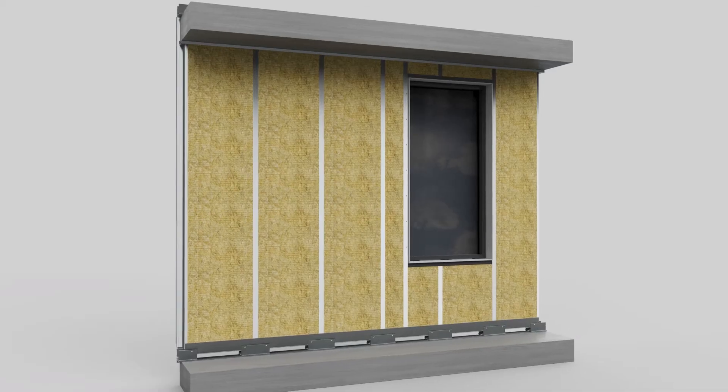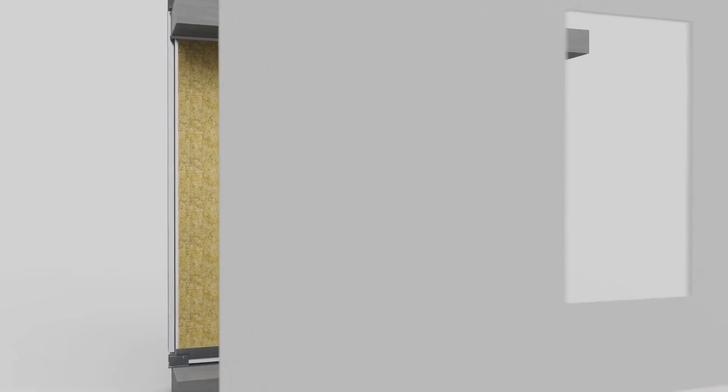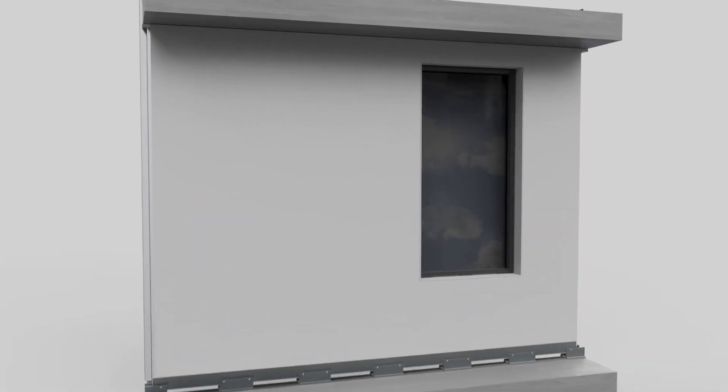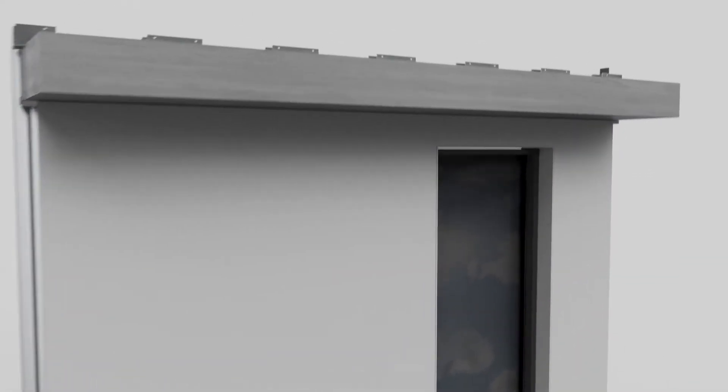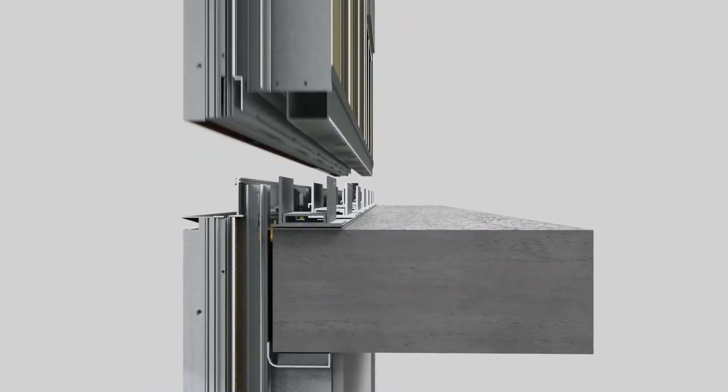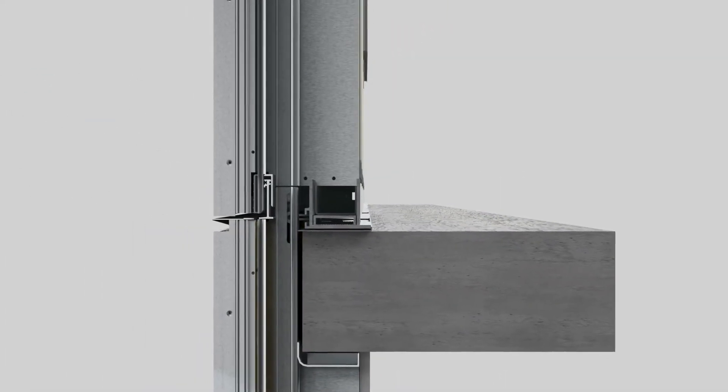Dry gasket joints and integrated drywall attachments enable faster installation inside and out, with no scaffolding, mast climbers, or exterior sealant work required.